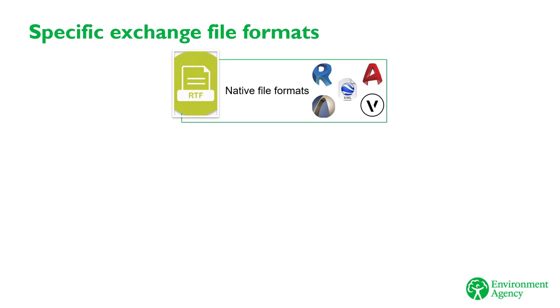Autodesk Revit. However, the complication occurs when other parties do not use the same software type or version, e.g. a designer using Autodesk Revit 2019, and another is using ArchiCAD 2019. Therefore, to overcome this obstacle, we ensure within the BEP, BIM execution plan, that all designers export their design to a standard coordination file, and in this instance, it is Navisworks coordination file.